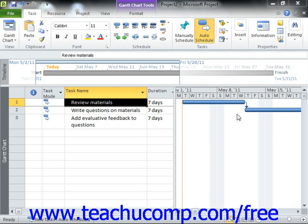The problem that often occurs when creating tasks in this manner is that you severely limit the task rescheduling potential of Microsoft Project. A better way to set deadlines for tasks is to simply set a deadline date for a task and use the default as-soon-as-possible constraint. This way, Project can reschedule the task with the greatest flexibility and you will also be able to view the deadline date for the task in the Gantt chart.